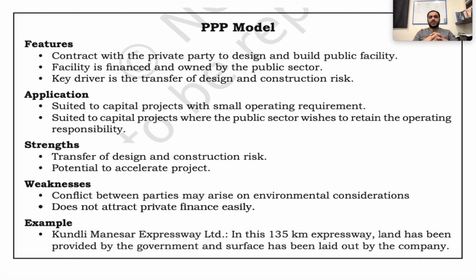It is suited to capital projects with small operating requirements. It is suited to capital projects where the public sector wishes to retain the operating responsibility. It is always suitable where capital projects with small operating requirements are there. It is always suitable there. The strength of this is the transfer of design and construction risk. This is the strength of the PPP model.